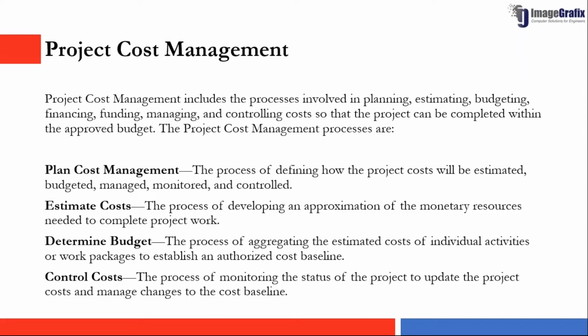Apart from that, all other cost related processes such as issuing purchase orders or contracts, invoices against these contracts, as well as payments for these invoices, everything is tracked outside of P6, not in P6. In P6 we are managing our resource cost, and sometimes it is very difficult to manage cost in P6 for hundreds or thousands of activities.